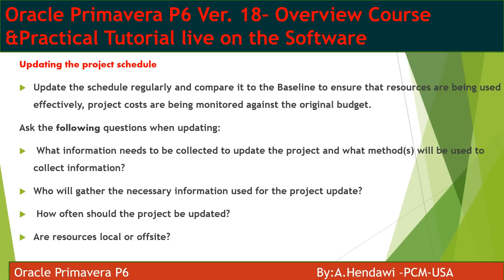When I set the baseline, I need to compare the current schedule to the baseline, measure the delays, and update the schedule. You have to ask yourself some questions: What information do you need to be collected? Who will gather the information? How often should the project be updated — weekly, monthly, bi-weekly?